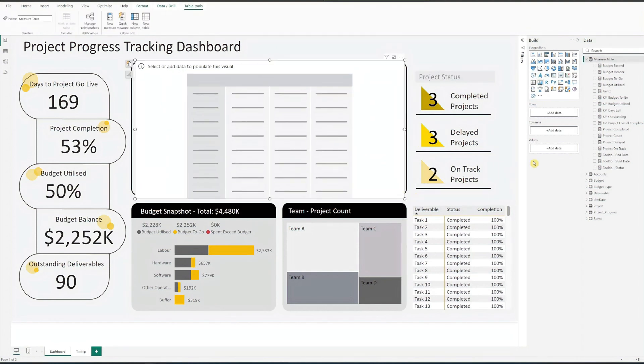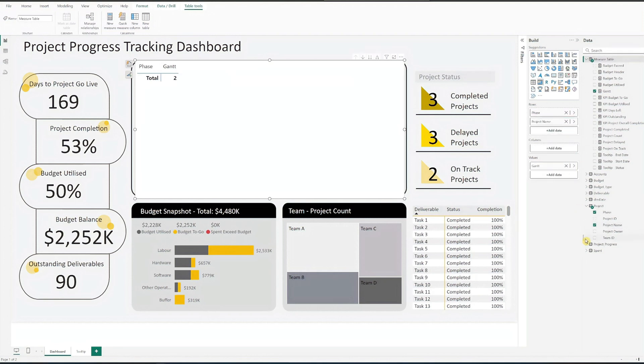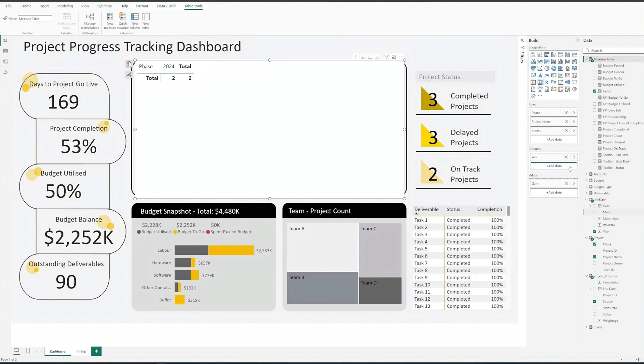Now, let's configure our fields. First, drag the field Gantt to values. Add the phase, project name and source to the rows field. Then add year, month and week number to the columns field.